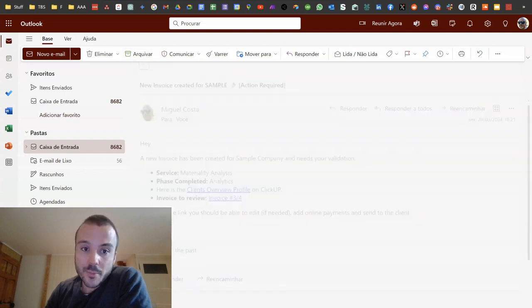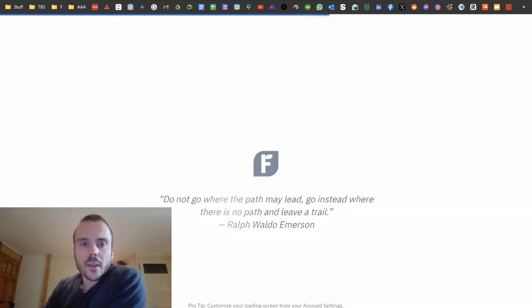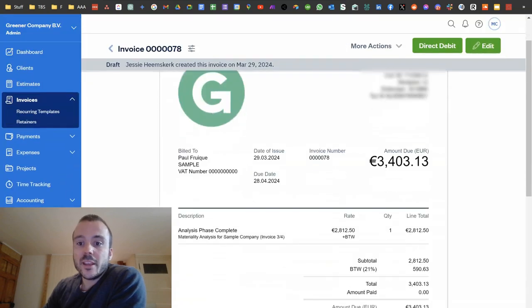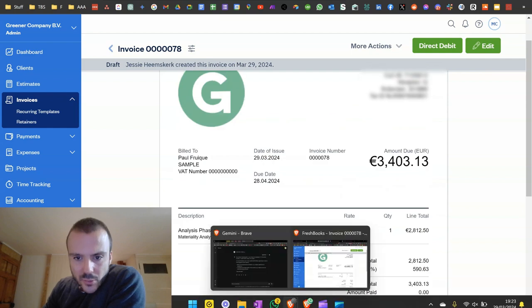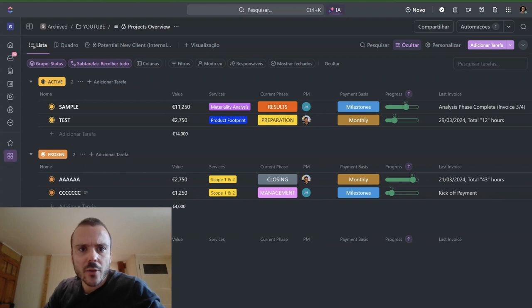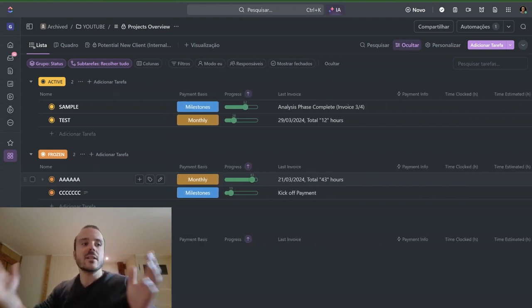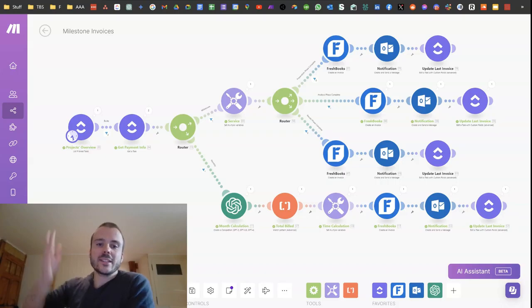The other example is a new invoice created for 'sample' — invoice 3 out of 4, so this is the milestone. It shows the total value of the project divided by four: the total value is 11,000 euros, so in this case I'm invoicing one fourth of that. This is automatically updated, ready to go. That's a quick overview of our invoicing automation.